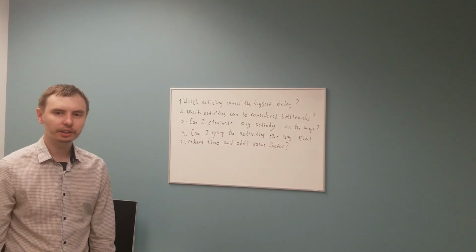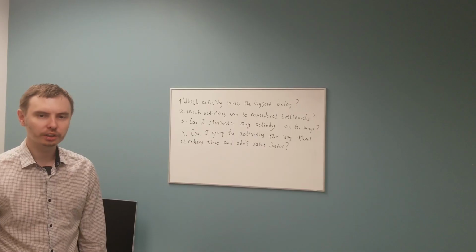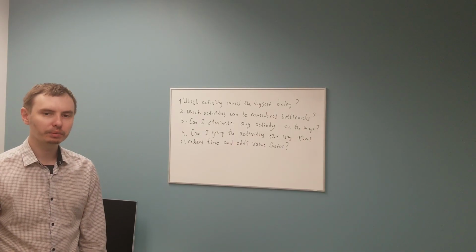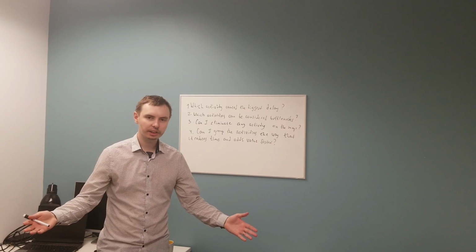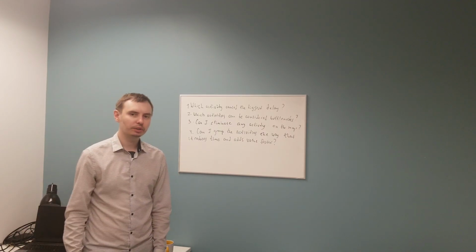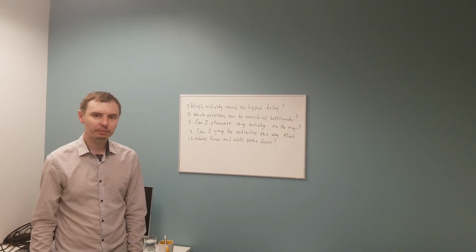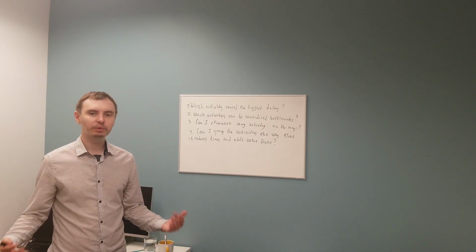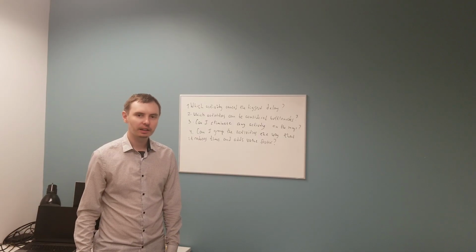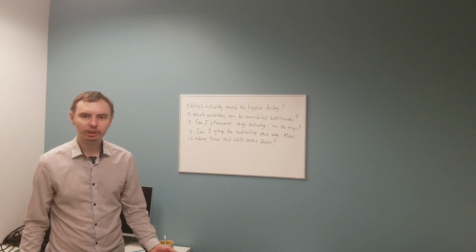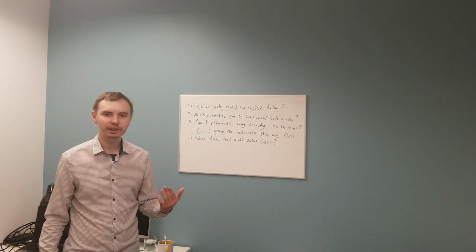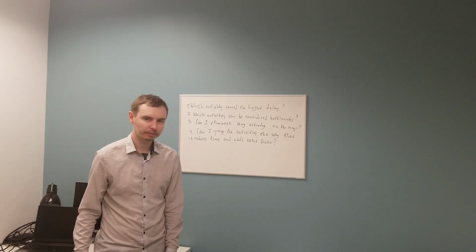Many of these activities correlate with methods and techniques used in other tools of the Lean development framework. For example, concurrent development helps to reduce the time of development activities by executing them in parallel by multiple teams. This is an example of grouping that could benefit the process. A lot of other techniques and methods exist. The idea is to review the map, find opportunities for improvement, and make adjustments. Once this is done, the map can be considered more effective and optimized. Authors state that the exercise, although it sounds trivial, can actually expose a lot of problems and unnecessary burdens that could be easily fixed and thus effectively improve the timeline.